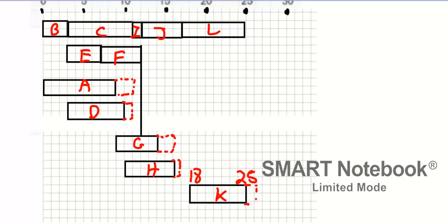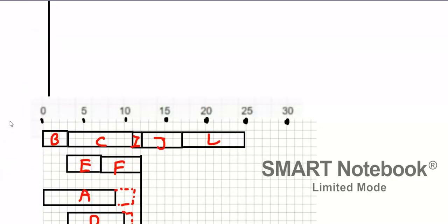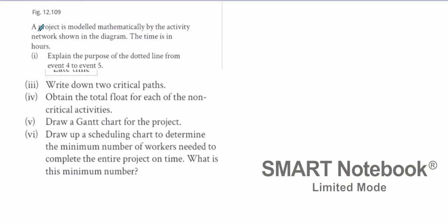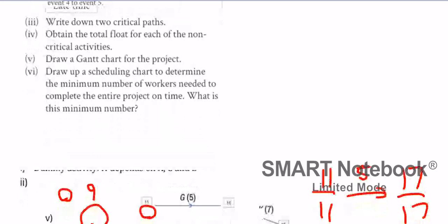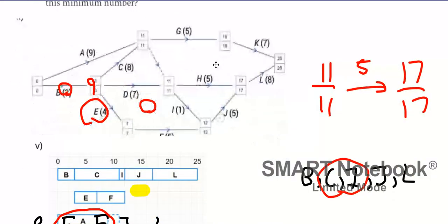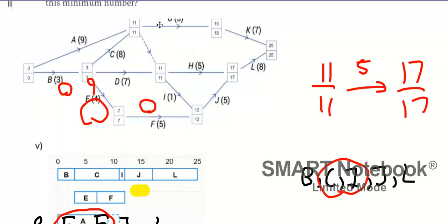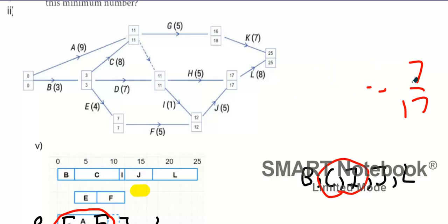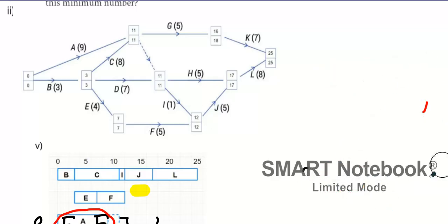No. Right, guys. Now, there is a useful thing we can do, and let me show you. We can figure out roughly how many people it takes using the following. Where is this graph here? Not that graph. This graph here. Ever see this graph? Okay, now here's what we're going to do, and you're going to help me do it really fast. I'd like you to add up the total amounts of how long each activity takes in total. So 9, 3, 4. Take out your calculator, add all these together.